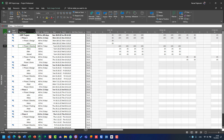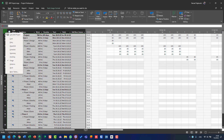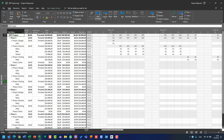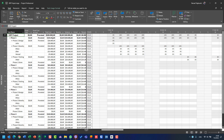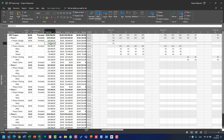If I want to see costs, I can go here and choose Cost. Now in Task Usage, I see fixed costs for each and every task and for each and every resource. I can also see the total cost for the whole project — the total cost for Phase One, for Phase One Design, and the total cost for John who is going to work on Phase One Design.